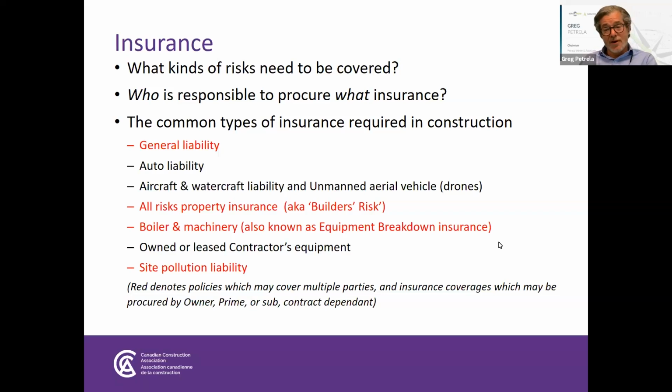And then there's third party liability coverages, which is where a party, a contractor, will purchase insurance to protect them against injury or damage to third parties, like damage caused by your work, or damage caused by your vehicles, or injury caused by your heavy equipment, etc. So you have these first party risks, which is to tangible property that you want to look after, and third party risks, which is your liability to third parties, principally for property damage and bodily injury.